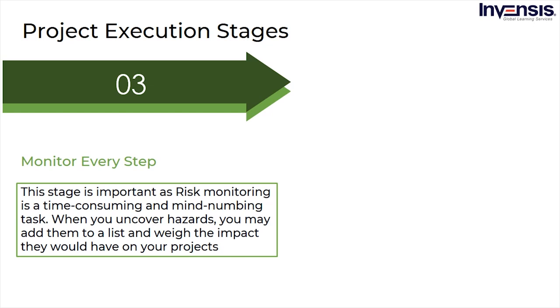or team in the past. Then, using a situational analysis framework like PESTLE, identify external dangers. Examine your project planning documents to determine the project's underlying hazards. Then make a list of any potential dangers to your project and devise a strategy for dealing with them. That way, if something unexpected happens, you'll have already performed the critical tasks.